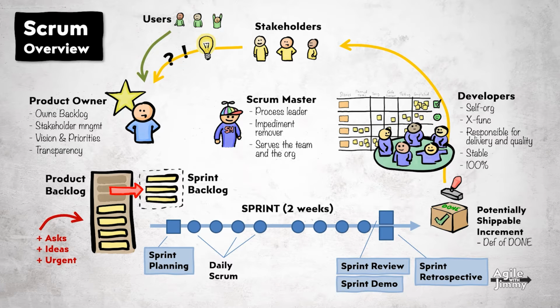One habit many successful teams have, even if it's not described in the Scrum Guide, is the backlog refinement meeting. Once a week, the whole team looks into the future, discusses long-term strategies, and works with the product backlog to ensure it's fit for the next sprint planning. This meeting is typically facilitated by the product owner. And there you have it, Scrum in a nutshell.